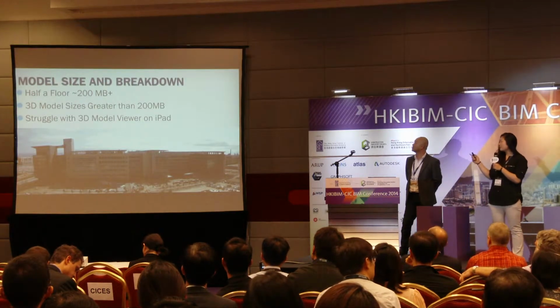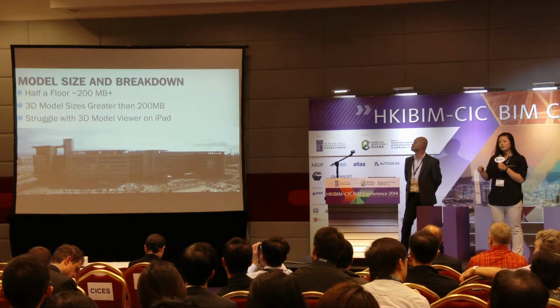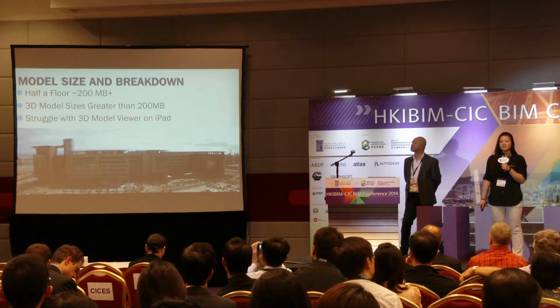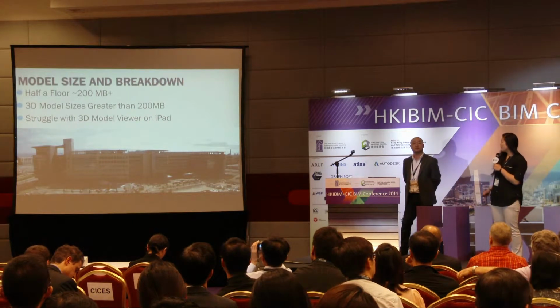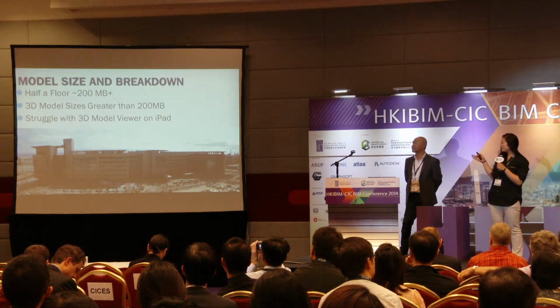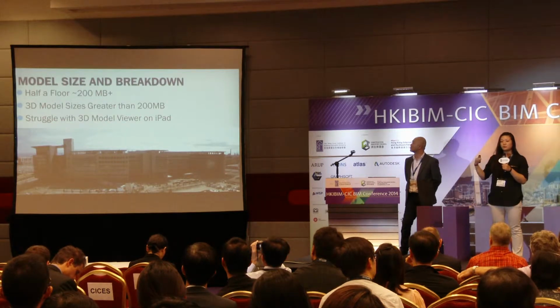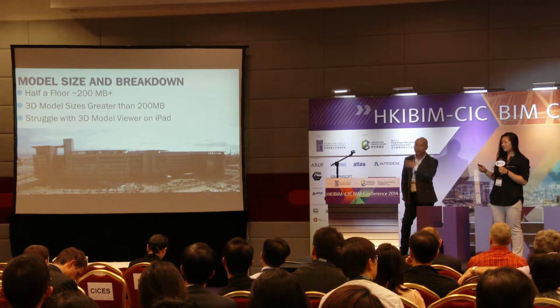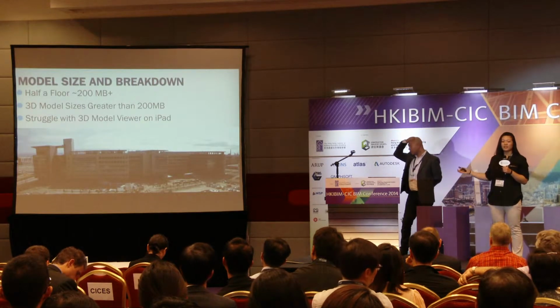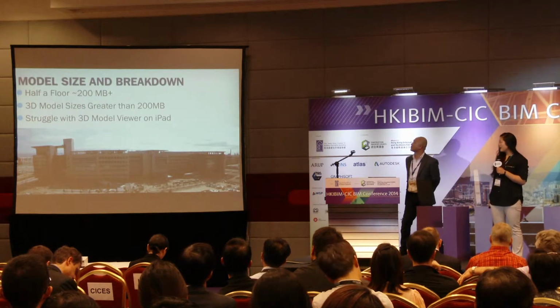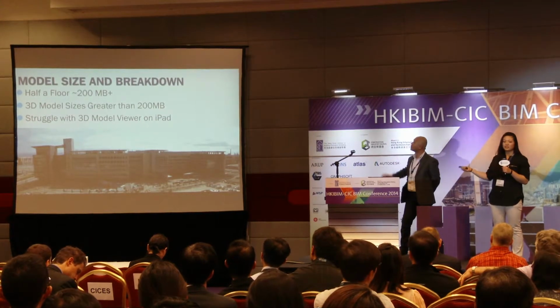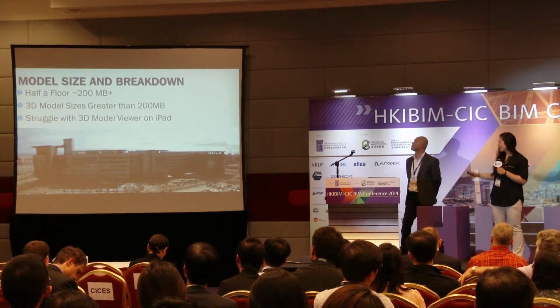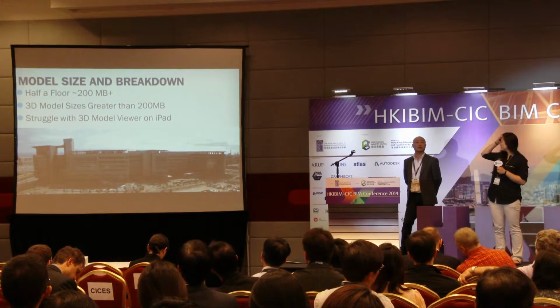In terms of the model, during MEP coordination with BIM, we had to break out each floor of the hospital into 2 files, a north and south, because the size of the model was just so big. It's such a detailed model. Each half of a floor is greater than 200 megabytes, so that's the size of the NWDs.